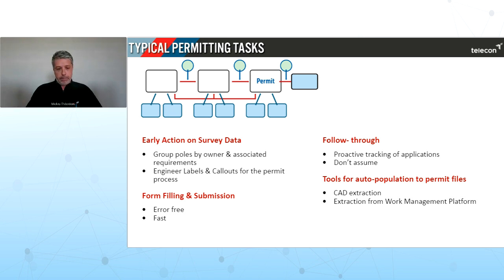One last important note on permitting. Once all your permits are submitted, you should consider employing a small team of coordinators for follow-up. Navigating each permit's timelines. Have them work the phones, stay on top of pending permits, keep them moving until it's approved. Well worth the investment, and this will prevent or minimize delays to the construction team.